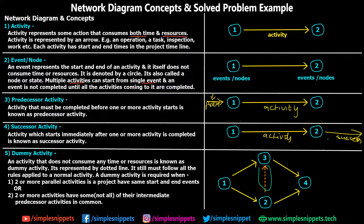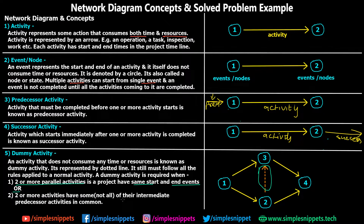A dummy activity still must follow all the rules applied to a normal activity. It is required when two or more parallel activities in a project have the same start and end events, or when two or more activities share some of their intermediate predecessor activities in common. These two points will become clearer once we see a numerical that actually requires a dummy activity.